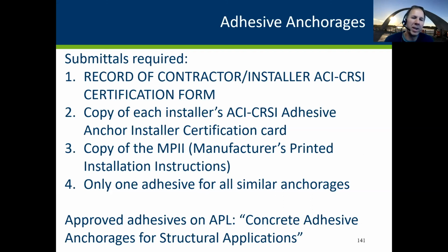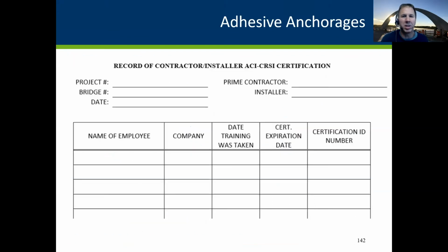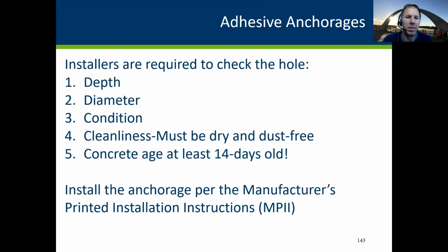We really only want one adhesive on the site. It'll create confusion otherwise, and the contractor can go to our APL for concrete adhesives for structural applications. So this is a form. It is on our website that we want the contractor to fill out and give to you, saying who is going to be installing anchors on your job.